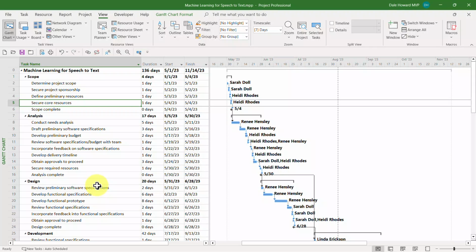Here's how to save the customized Gantt chart arrangement as a custom view. And by the way, when I say arrangement, what I mean is the exact columns on the left, the column widths, the way I've set them, the level of zoom on the right side in the Gantt chart screen, also the scaling, the custom header, the custom footer, the lack of the legend, and the print exactly 5 columns on every page. All of that is saved in the custom view.